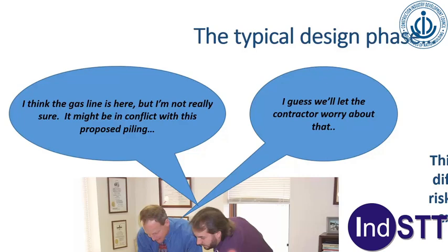About that. This makes it extremely difficult to manage the risks that are created by existing underground utilities. This is a fact of life. The design engineer is not responsible for getting the information on the underground utilities, because it is supposed to come from the client. Client gets it from the old records. Contractor does the work as per the design, etc., etc. So ultimately, at the end of it, no one is answerable.